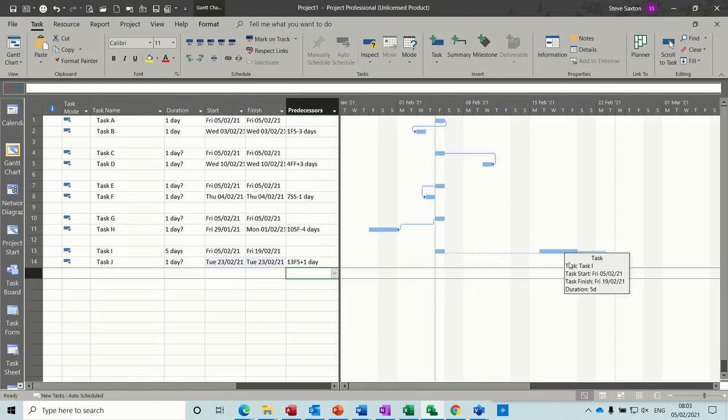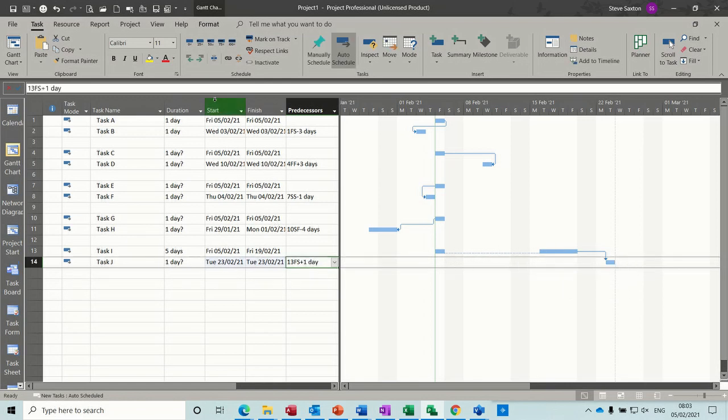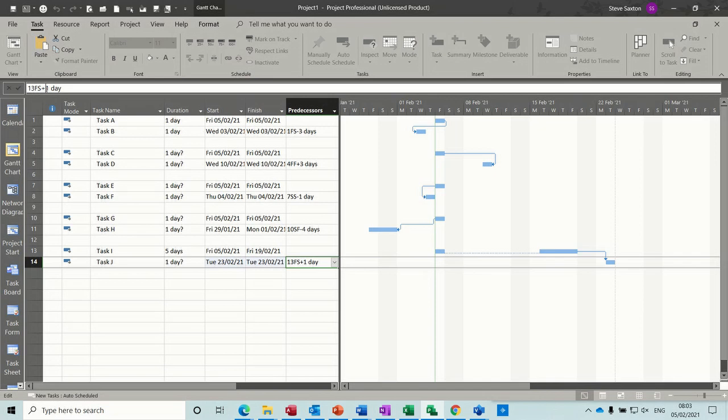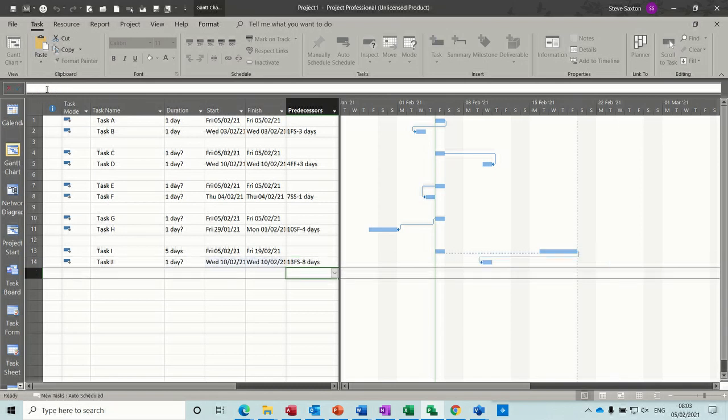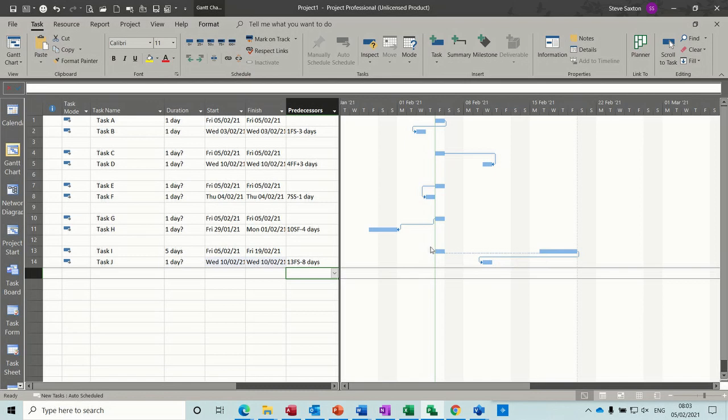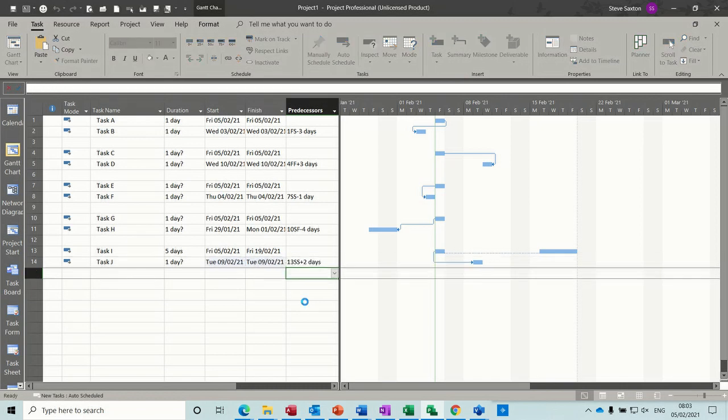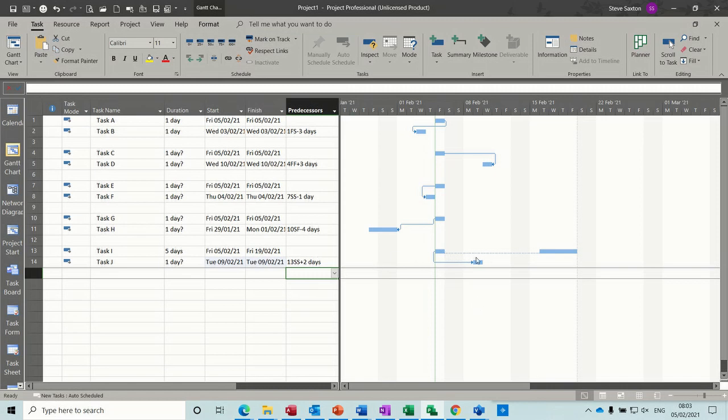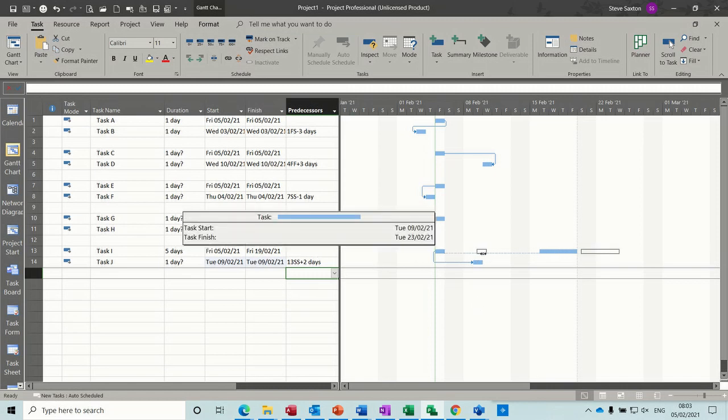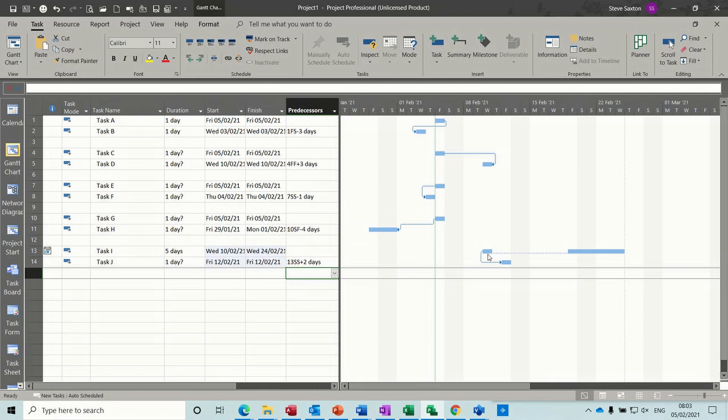Now if I wanted that task to be linked, but to sit in there, I would have to put a lead on it. So something minus, say, 8 days. Now it's sitting in there, that's not a great symbol. I don't like the look of that, but what you could probably do if you wanted something to sit there, is change that link to be 13SS plus 2. So then it's sitting, or plus 1, so it's starting on Monday. And it's dictated by this, if I move this, this is pushing that one along.